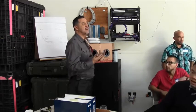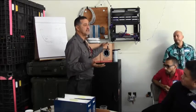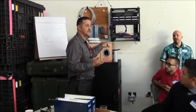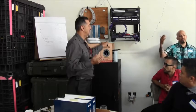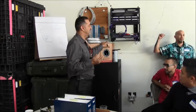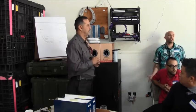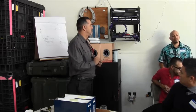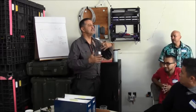So that job's 100,000 feet of cable, and these are 1,000-foot boxes. So 100,000 feet is 1,000 boxes of cable. And it's going for right now about $1.25 to $1.50, almost up to $2. It's about how close you get it to the port. Because from the port they take it back to China and strip it all down, and they use the copper themselves. So that's all transport costs. You can make some money off of spare cables and stuff, so going into the project.